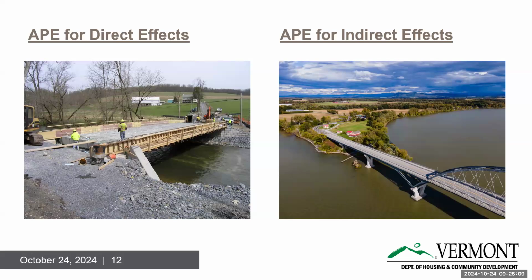But again, the bigger your APE can be, and we're not saying so big that you're doing an architectural survey of the entire state, but replacement of the Lake Champlain Bridge should have been a generous APE to pick up Chimney Point, all the resources related to it, the historic building across the street, and even including, you can see a little blue-green over there, where the road turns, the restaurant, just to make sure that all of the standing resources and the archaeological resources are taken into account, and including underwater.